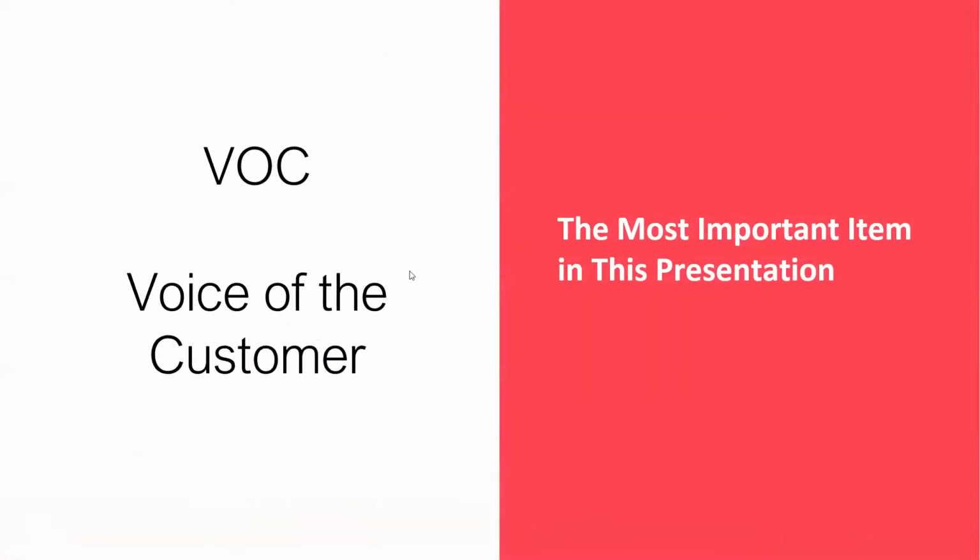So ultimately what we learned, and I mentioned this in the last presentation, was the importance of the voice of the customer. You almost want the customer to be part of your project planning team, to the point where they're constantly iterating what they need. Now, there's going to be a sign off at some point for a scope, otherwise you can't make an estimate for them and actually quote them a price.